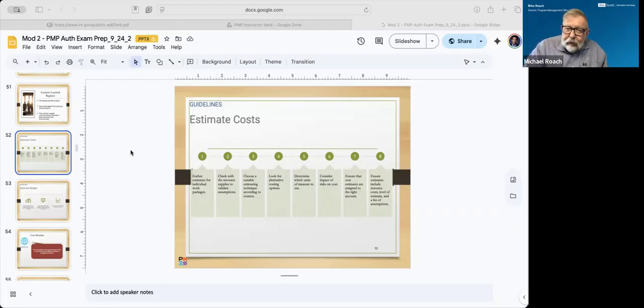If your particular distribution avenue failed, the futures that you bought on the market would allow you to take whatever money you've earned on it and source it from a different location or different company. So for these really large things like building dams or infrastructure for entire cities, you have multiple distribution channels for getting the raw materials that you need. It cannot be just one, as there are so many things that happen.